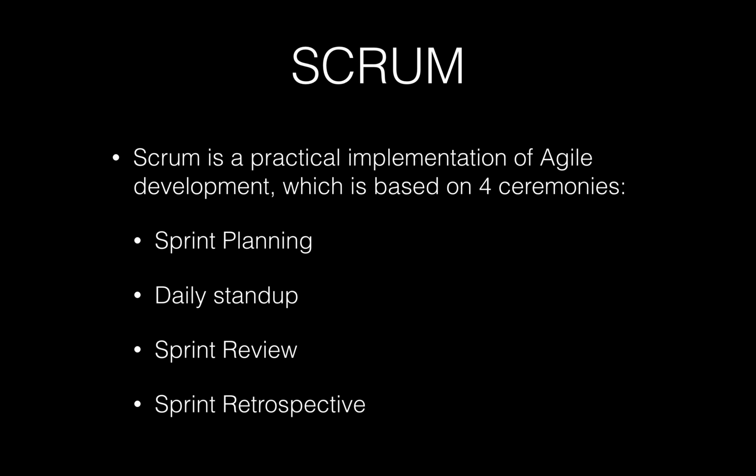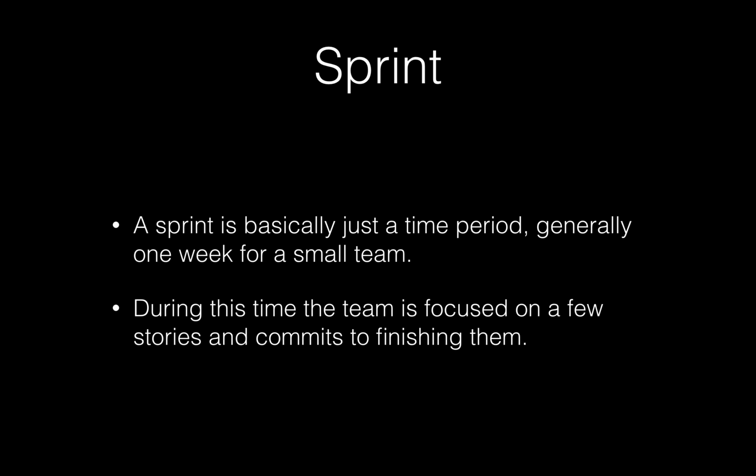Sprint retrospective is an internal event where the team gets together and sees, you know what, we did this 1 week with all these processes that we have in place. How can we do things better? What can make us more efficient in developing? That's where the team comes together and challenges themselves to do better. So I'll go through each of these.